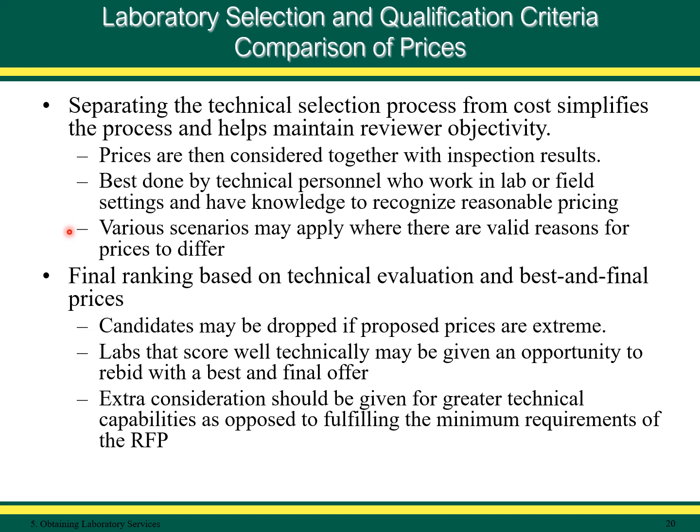There are various scenarios where it may be appropriate for prices to differ. The final ranking is based on technical evaluation, including proficiency examination and audit, and the best and final prices submitted by each laboratory. Candidates may be dropped, generally, if the proposed prices are extreme. Laboratories that score well aside from their prices may be given an opportunity to rebid with a best and final cost.